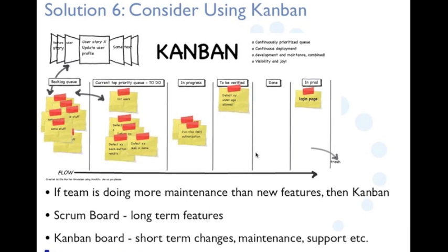The second way is where you have long-term features that are always there to build. So after some time you put across two teams instead of one. One team continues to work on Scrum and goes on building the long-term features, and you coin a newer team after you go live on production, which takes up Kanban and uses the Kanban board. That team handles all the requests coming in through sales, marketing, stakeholders, or production emergencies. So that's the second method people definitely use.